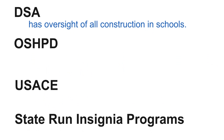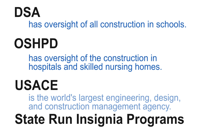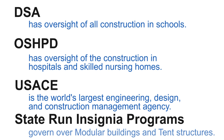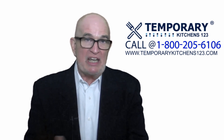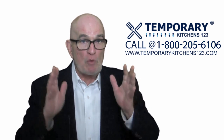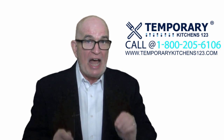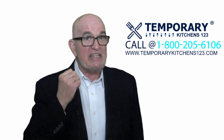Now, the DSA has the oversight of all construction in schools. OSHPD has oversight of construction in hospitals and skilled nursing homes. And USACE is the world's largest engineering, design, and construction management agency, and state-run insignia programs govern over modular buildings and tent structures. Now, the DSA, OSHPD, and USACE are typically more rigid because they are serving as a source of refuge in case of a catastrophic emergency. So their processes will be more time-consuming, daunting, and indeed challenging.